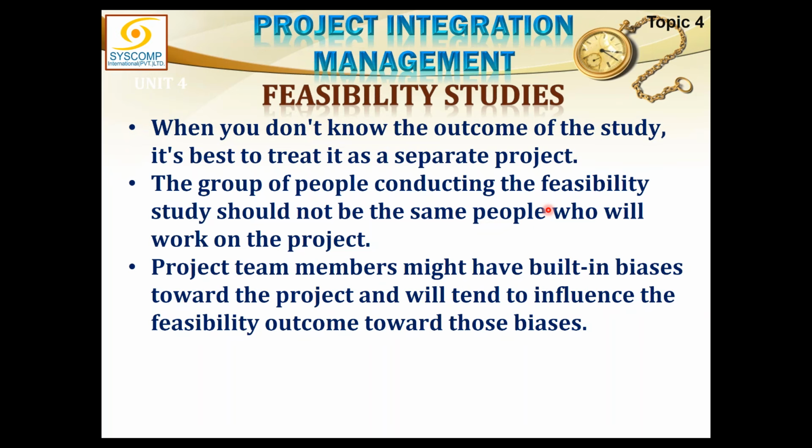So even if you are conducting the feasibility as a part of the project, the feasibility should be conducted by a third party, because the project team is also biased towards their own, internal thinking, how they want the project to turn out. So they will make the project turn out the way they want. So the feasibility will prove the same. So better get the feasibility done by an outside body.